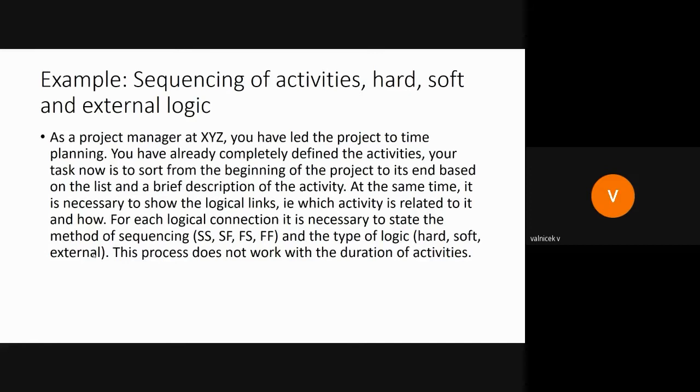At the same time, it is necessary to show the logical links. In example, which activity is related to it and how. For each logical connection, it is necessary to state the method of sequencing and the type of logic: hard, soft, external. This project does not work with the duration of activities.